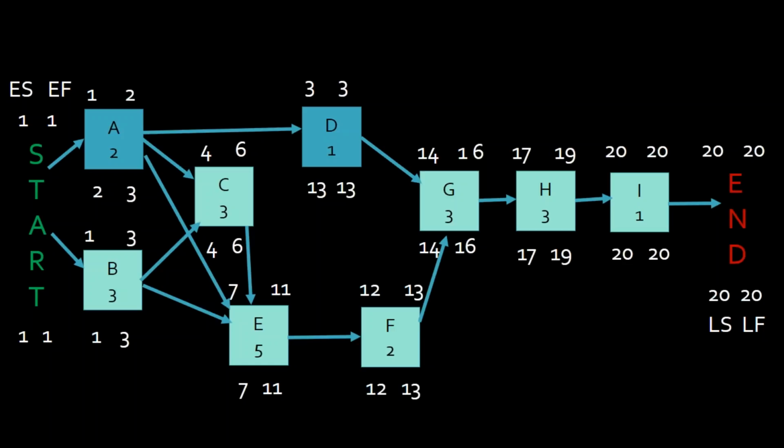And why is it? Because it's the longest path of zero float activities from start to finish through the network diagram. They all have no wiggle room to them. That makes them critical path activities. That means we have to pay real attention to them. The reason they make them critical path is that if any of them are delayed, it will delay the final schedule date. I will necessarily move the scheduled date out if any of these critical path activities don't happen when they're supposed to happen.